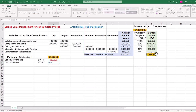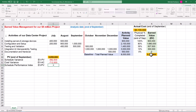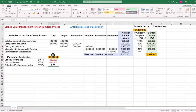Next, we can find cost variance or CV, which is earned value minus the actual cost. The negative CV of $712,500 shows that the project suffers from budget overrun and consumes more financial resources than initially allocated or planned. Following CV, we should calculate the schedule performance index or SPI. Click on the relevant cell, press the equal sign, then divide earned value by planned value. An SPI less than 1 means that our data center project is completing work at a slower rate than originally planned — tasks are taking longer to complete, leading to schedule slippage and delays in achieving milestones.